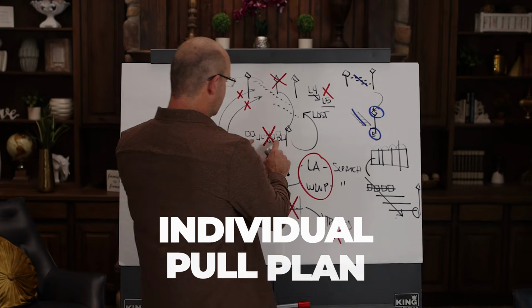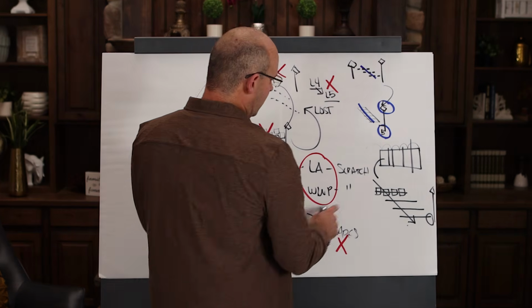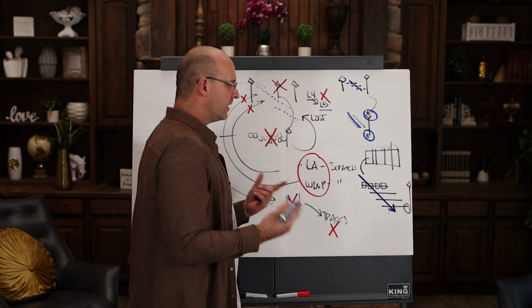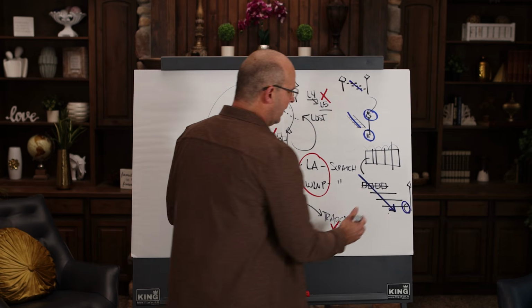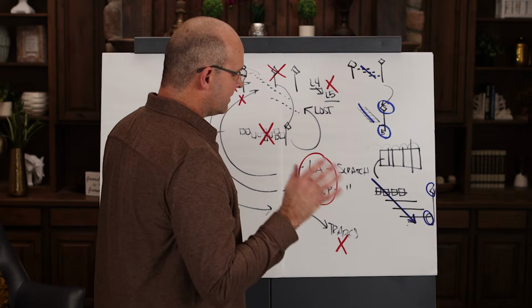You should never see an individual pull plan. Unless you're just doing one small area, you should see that pull plan going from zone to zone to zone so you have trade flow. You should be able to gain buffers at the end because you're optimizing, and you should be vertically aligned to your milestone. And so that is the key.